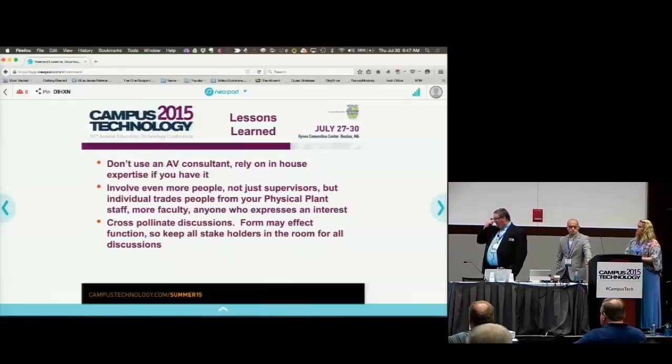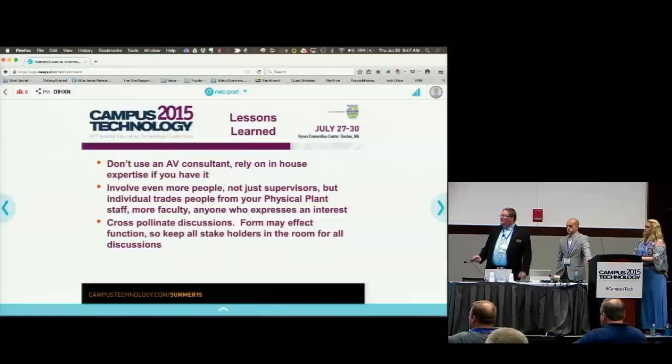And cross-pollinate the discussions. There'd be times we'd be having a meeting, and then they'd say, okay, we're going to talk about furniture now, or we're going to talk about wall coverings. And me and David would get up and walk out. Okay, y'all go on with that. We've got other things to do. There are some things we would have liked the room configured a little bit differently. If we'd stayed in the furniture discussions, or, you know, we need sound dampening on a wall here, that would have been a little bit better, and we had to retrofit a little bit of that. So just be involved in everything. Even if it doesn't sound like it's AV or IT or whatever your function is, in these interactive rooms, it all comes together.